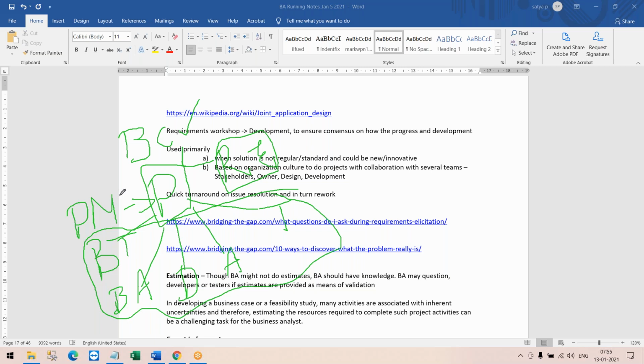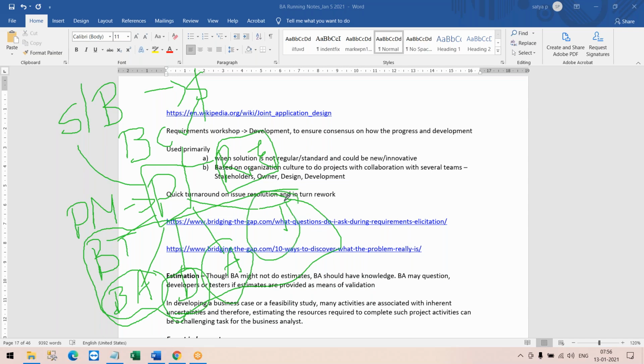Now, this project manager cannot just start right away into the project. He needs a proper estimate of how much time it will take to deliver this project, because he is ultimately responsible to the sponsor or the business people who give us the dollar amount, right? So the project manager asks for estimates from the different teams. They might ask the BA, how much time would you take for this particular project to get the requirements, analyze the requirements, and do the acceptance testing. He might ask the same of the development team, the architect team, the testing team, and so on.